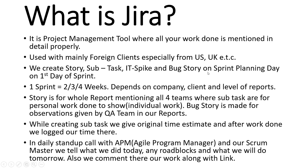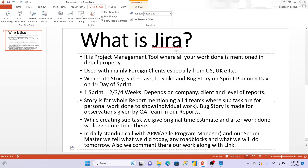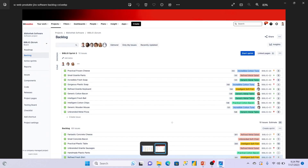All of this — story, subtask, and IT spike — is planned on the first day of the sprint, which is the sprint planning meeting, except for the bug story. We don't create bug stories on sprint planning day because we don't know whether bugs or observations will come. Sometimes I have made error-free reports too.